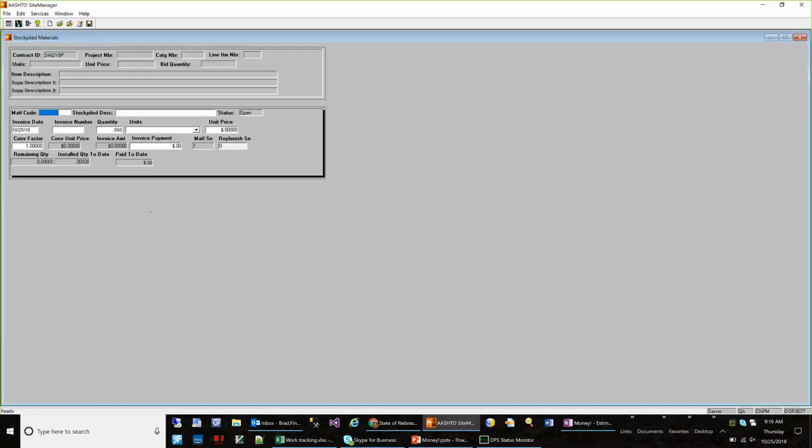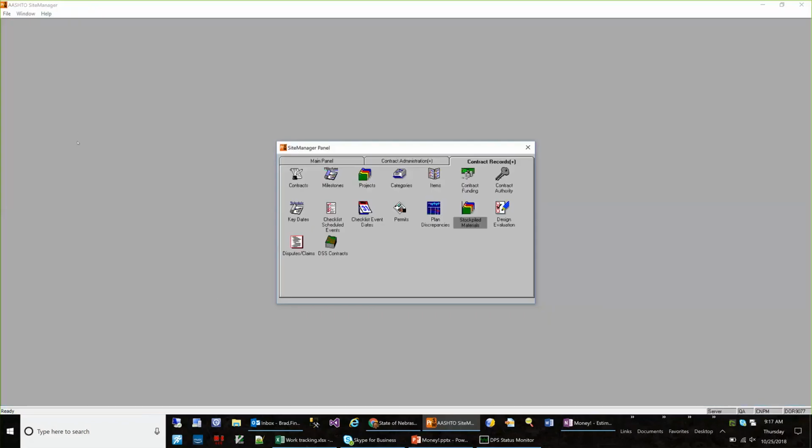So the contractor has basically brought the material on site, so we're prepaying them for that. And then as the stockpile is depleted or used up, then that money comes back off of the stockpile. And you'll see that adjustment in the actual stockpile line item on the report.